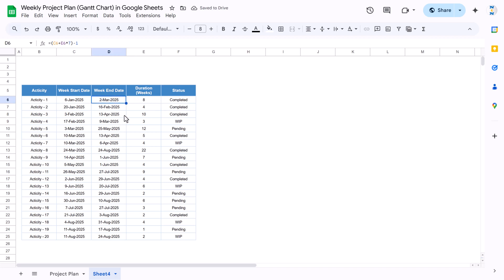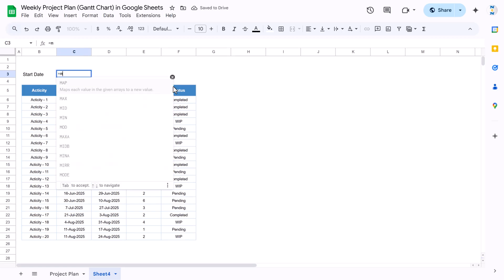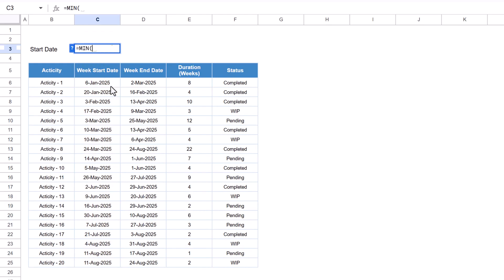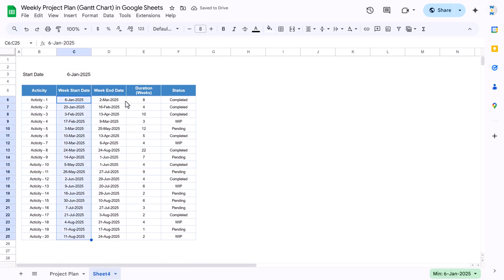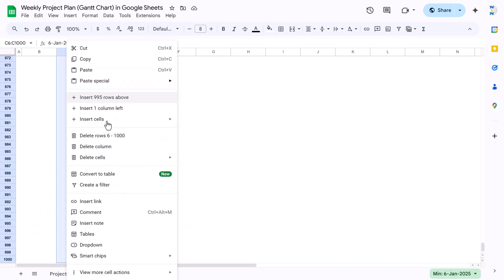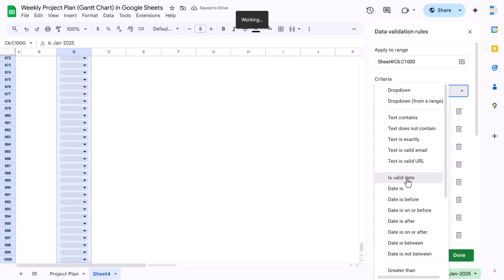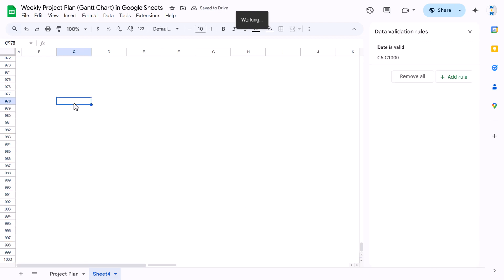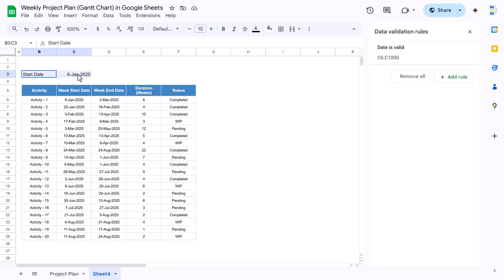Now we'll capture the project start date, which will be the minimum of all the week start dates using the MIN function. For the week start date column, right-click, go to the dropdown, select 'Is valid date', and click Done. The benefit of this is that when you double-click any cell it will show a calendar so you can select the date easily.